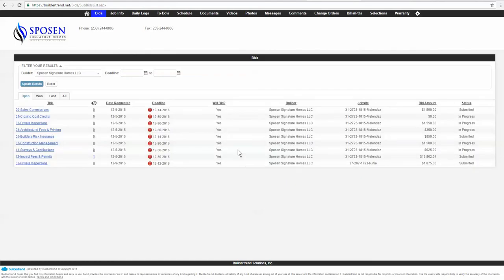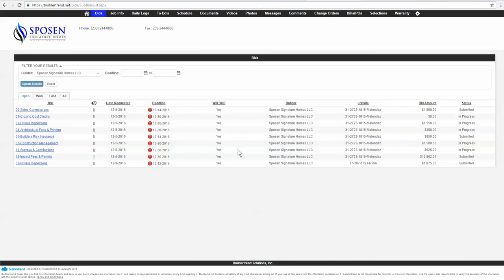And that is basically how you submit a bid. The next video that we're going to do in this series is how to accept a PO. Once your bid gets submitted to us, we review the bids. And like I said, we accept the more competitive of the bids. We do look at quality of work, obviously, as well as price. So we review those two things. Once we accept it, it gets accepted, and then it will get turned into a purchase order. The purchase orders are going to have to be accepted by you. And I'm going to show you in our next video how to do that.